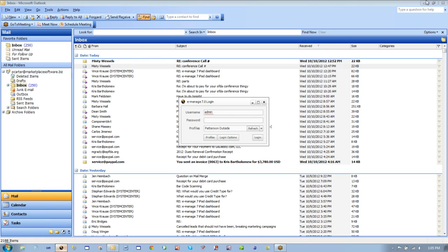And then the phased payments, we collect as we go. So as we demo, we collect a check. You can set the job up, you tell it the amount you collect at the end of each phase, and it prints out on our work orders, and it also appears on the schedule for the scheduler to know that money's due. They're not supposed to schedule the next phase without collecting a check for the prior phase. So there's little hot buttons that alert and help internal people.